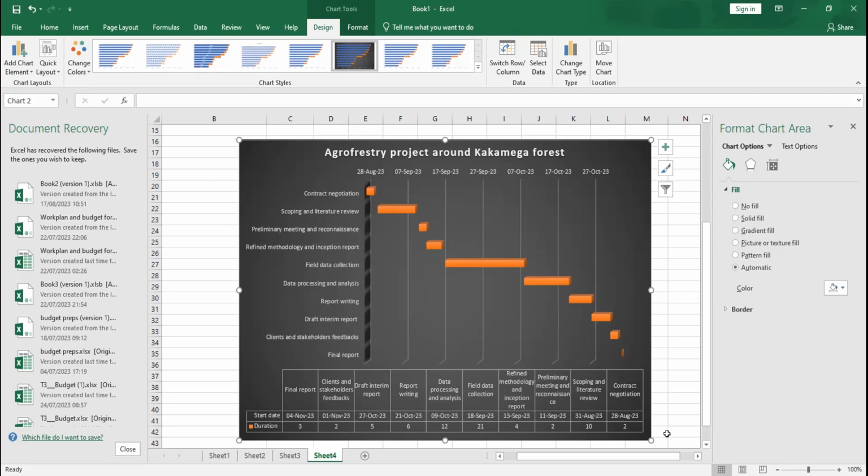Remember, in the textbook, we schedule using what we call PERT and CPM, Program Evaluation Review Technique. That is purely for the academic, the certification, people who are doing the certification. You will be expected to do forward pass and backward pass, and calculate all those. But for work, because this is a professional training geared towards work, we only reach this Gantt chart, because the Gantt chart is for direct work application. We can draw the Gantt chart in MS Project, or we do it in Microsoft Excel.